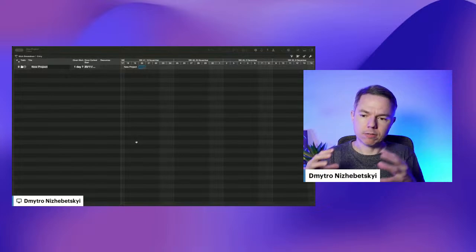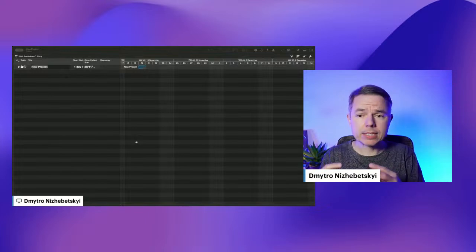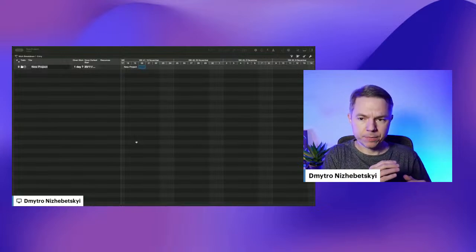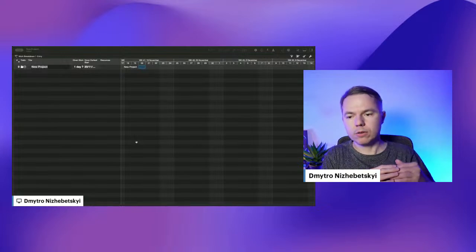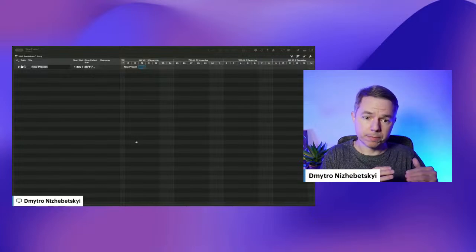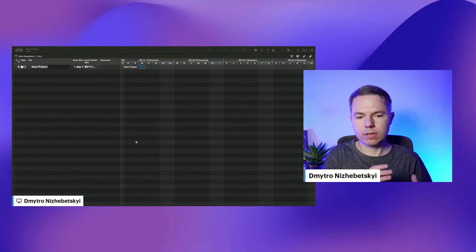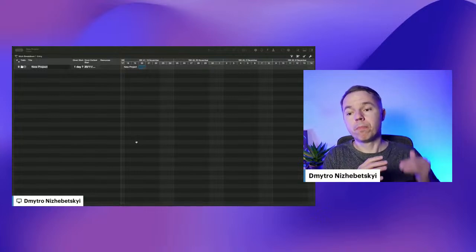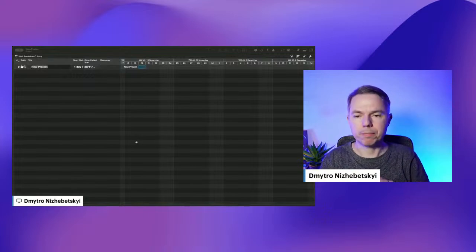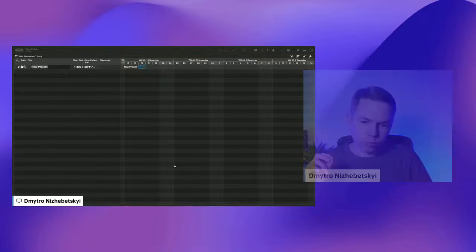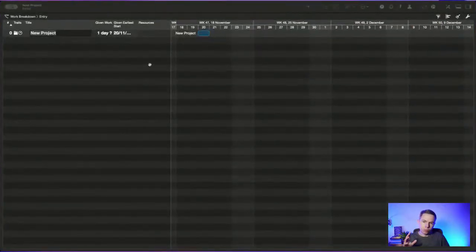And then you break down those tangible pieces into smaller pieces, and then you break down those smaller pieces into tasks. And when you do this, you are going from top to bottom, decomposing all the work, and then you do all the good stuff like estimating and scheduling from the bottom up. That's where the bottom-up estimation approach comes from. So here's what we need to understand. We are working here with a work breakdown structure.